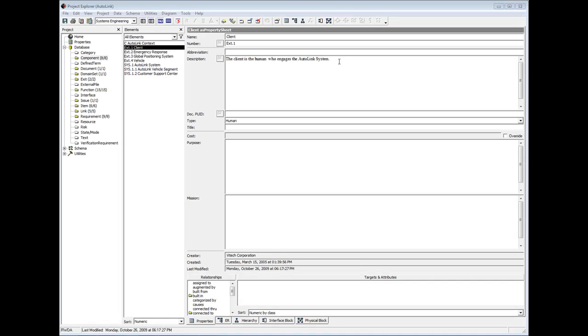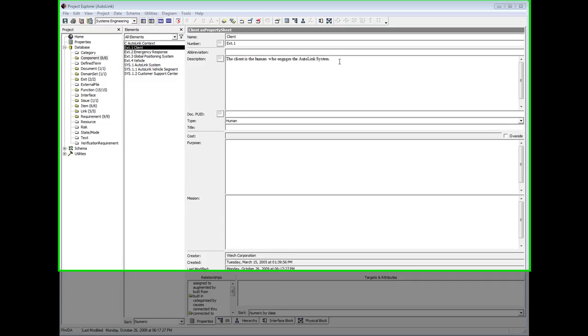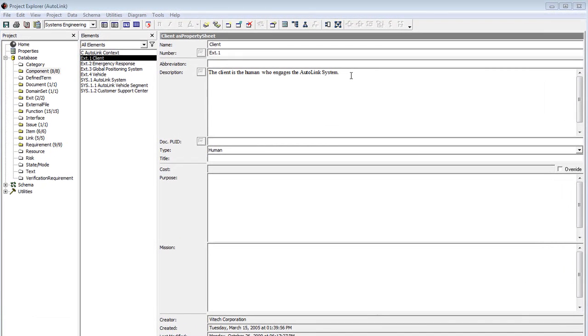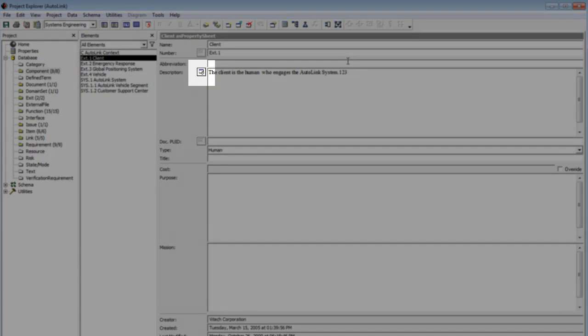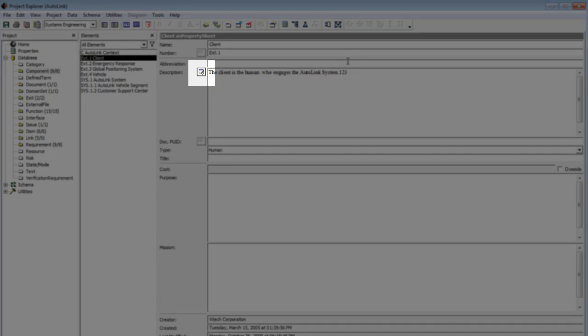The first time you enter information into a field, you are creating the baseline version. Subsequent changes to that field will create new versions and the versioning icon will change, letting you know that you have multiple versions available.